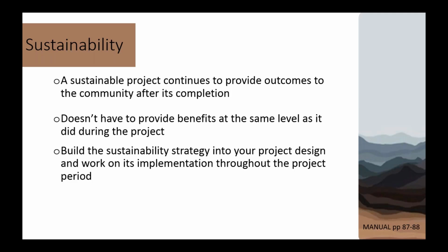So to do that, the most common methods are routinization or institutionalization of the project. It's a mouthful. That is that you're making those benefits a part of your everyday operations after the project has ended.